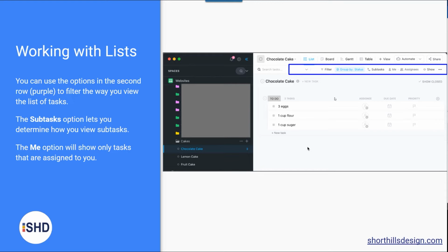So instead, for those items that really need a date, the question is, does the task need a date? If the task needs a separate date from the parent task, or the checklist item needs a separate date, like follow up with client in 7 days, that's got to be a subtask. But if we have something like checking to make sure the client has their accounts set up, do they have a GoDaddy account? Check. Do they have a Google My Business account? Check. Those are yes or no. Those don't require a date. Again, for us. Oh, and the me view is cool because it shows what I'm doing for me in this project.